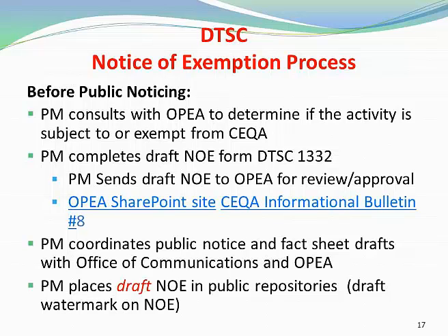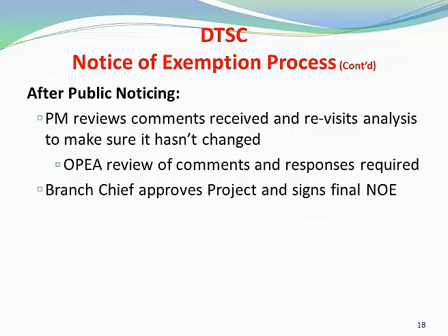The project manager will then coordinate the public notice and fact sheet content with our office and the assigned public participation specialist. The project manager also sets up the public review and comment phase for the project. And during the public comment phase, the draft NOE is marked with a draft watermark and made available for public inspection in the public repository and in EnviroStor.